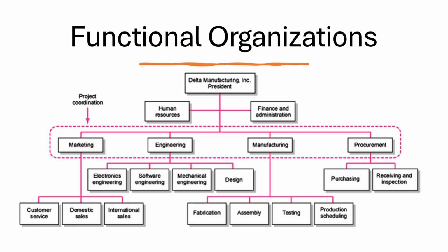The functional organization is also commonly used given the nature of the project, when one functional area plays a dominant role in completing the project or has a dominant interest in the success of the project. Under this circumstance, a high-ranking manager in that area is given the responsibility of coordinating the project. For example, the transfer of equipment and personnel to a new office would be managed by a top-ranking manager in the firm's facilities department. Likewise, a project involving the upgrading of the management information system would be managed by the information system department. In both cases, most of the project work would be done within the specified departments, and coordination with other departments would occur through normal channels.